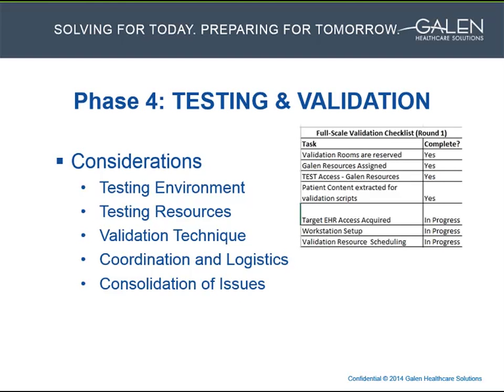As you can probably tell already, there's a lot involved with the validation phase. The planning and coordination can be very time-consuming and extensive. Some conversions may even staff a testing coordinator on top of the clinical analyst to help with the testing phase. So, as you can tell, planning ahead is essential. The preparation for large and full-scale testing may take up to 1 to 2 weeks prior to the actual testing.